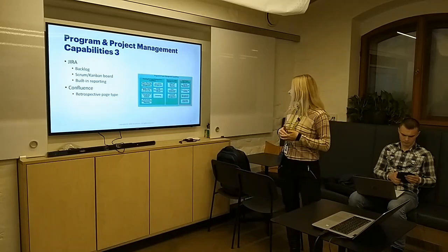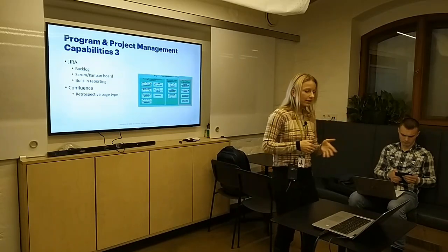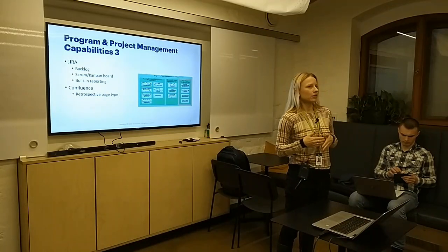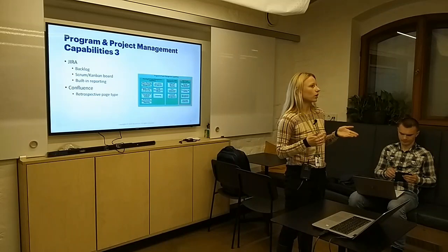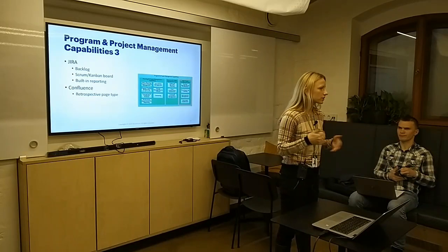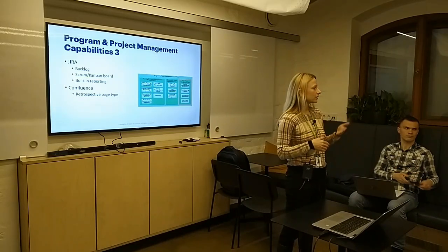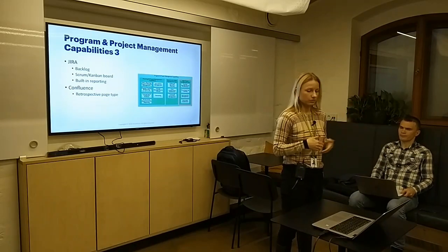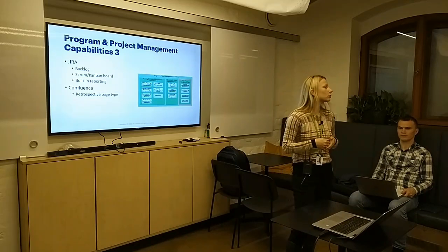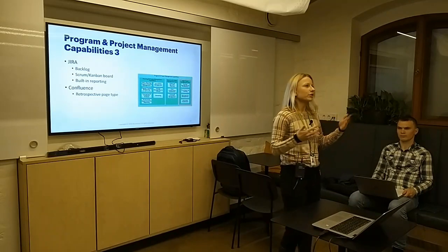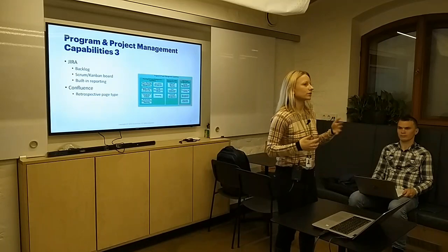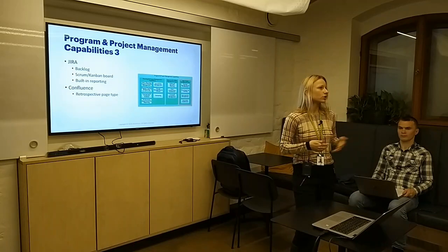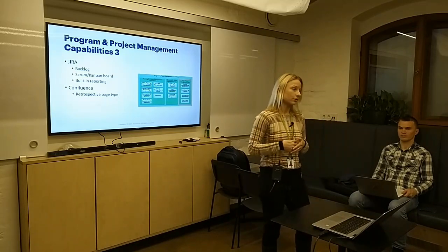So also Confluence is used here with the purpose to have retrospective management. We have great options in Confluence to have already prepared nice pages types where you can select retro and you will see already template for your meeting, and we use it. So we already have there how we are doing, what was great, what was not so great. So and of course each sprint we discuss it and document.